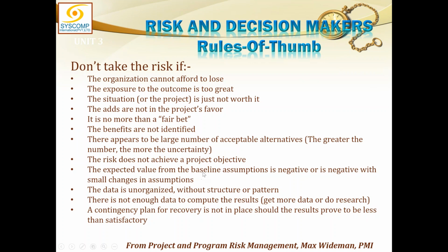The expected value from baseline assumptions is negative, or is negative with small changes in assumptions. Data is unorganized and incomplete, without structure or pattern, and that is going to be a big difficulty. There is not enough data to compute the results. Again, lack of data. A contingency plan for recovery is not in place should the results prove to be less than satisfactory. So these are some rules of thumb given by Max Wideman, and I have so far been referring to Max Wideman's book, and these were some very good points given there.